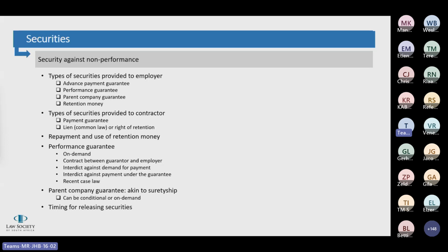A building contractor may, without alleging fraud, restrain the person with whom he had covenanted for the performance of the work from presenting to the issuer a performance guarantee unconditional in its terms and issued pursuant to the building contract, if the contractor can show that the other party to the building contract would breach a term of the building contract by doing so. But the terms of the building contract should not readily be interpreted as conferring such a right. This is similar to the position adopted in the UK on the proviso that the beneficiary of a contract can in principle be restrained from making a demand under the bond if the underlying contract makes express provision for that.